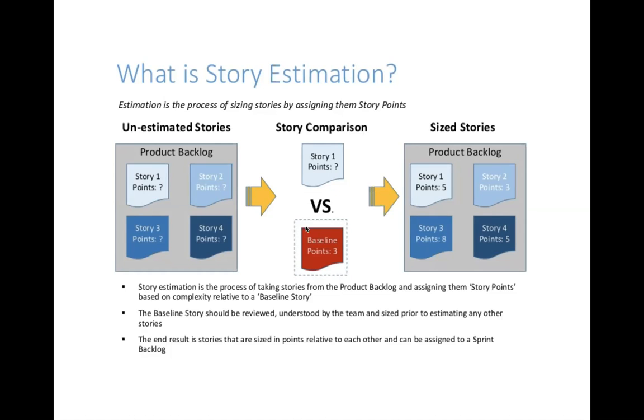It depends on the team understanding. It's not always going to be a task. So the team is discussing, and again the acceptance criteria is also there. If the acceptance criteria is more or the same, then we need to provide the same user story points. But if we see the acceptance criteria is having more work, then we can provide more user story points for the current story.